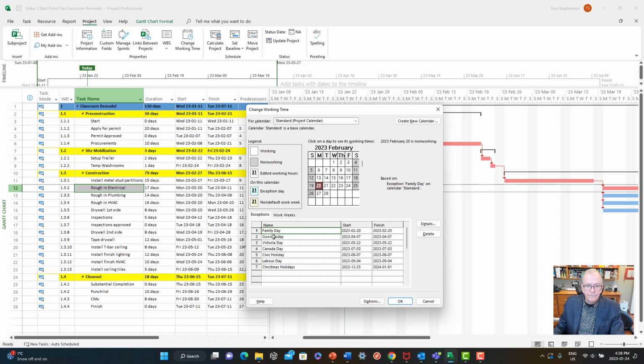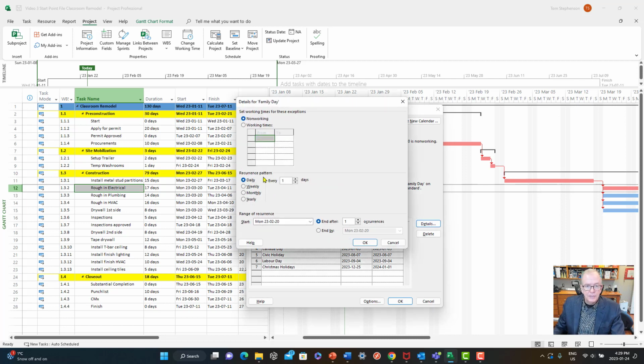So here, I'll click on Family Day. We're under exceptions. If I was to create a calendar that was 10 years long, well, there's some dates that are pretty easy to do and others that might take you a little bit of time. Family Day, I'm going to go to Details, and I'm going to say that I want to make it non-working, which it's showing. And I've got choices, weekly, monthly. I'm going to say yearly. And Family Day is one of those holidays where it's always the third Monday of February.